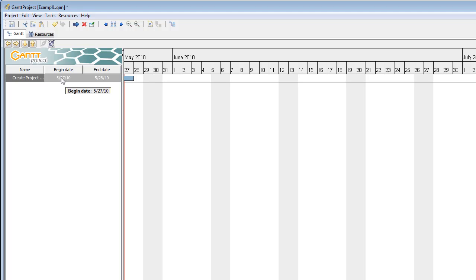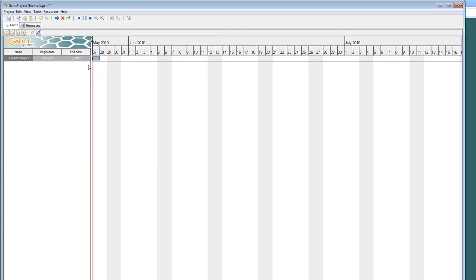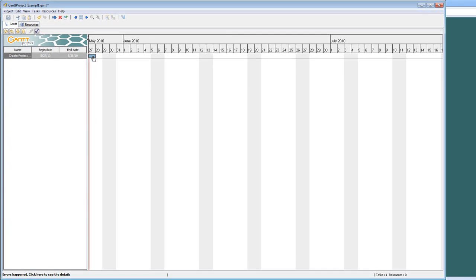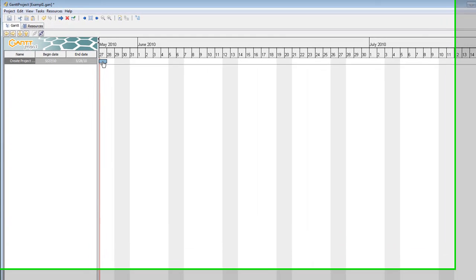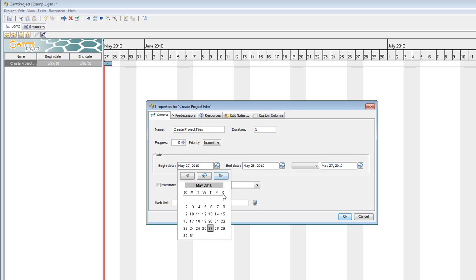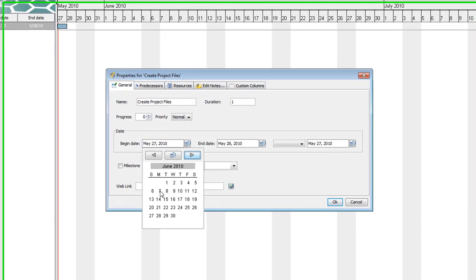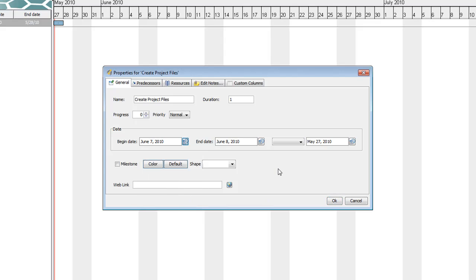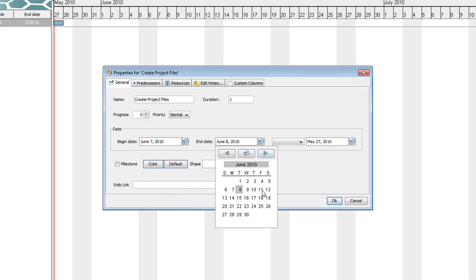Now the dates that you put in are going to be the dates that you actually have entered it. You obviously don't want those dates because it's a future project. So you just go over here to the timeline. Double click on it. This box will pop up and it will ask you to put in the begin date and the end date. So I'm going to go into here to show calendar. And I'm going to choose a date in June. Let's say June 7th. End date I'm going to say June 11th of that week.